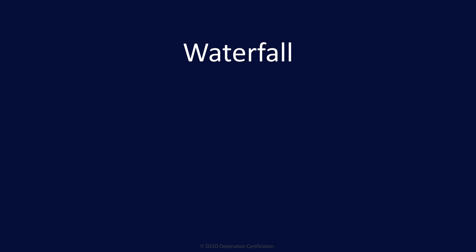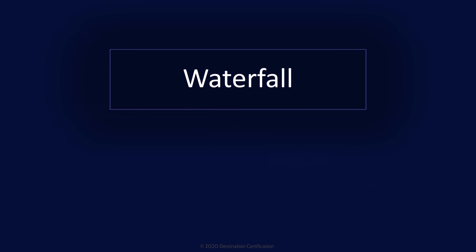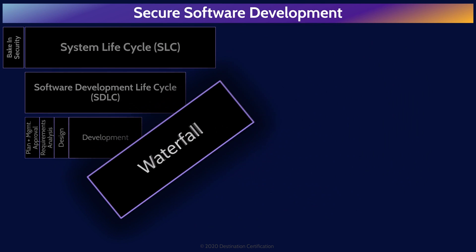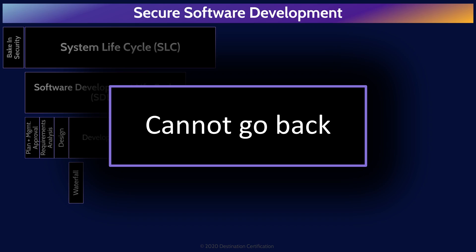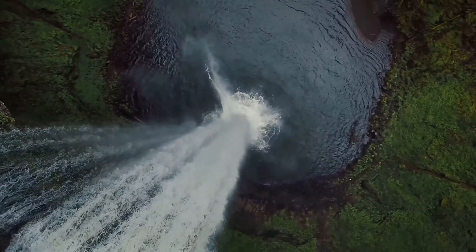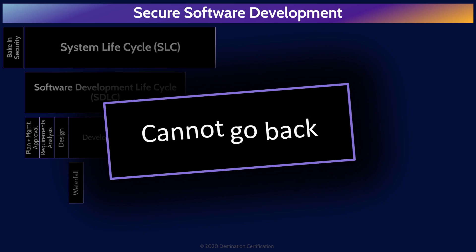Waterfall begins with a plan, then defining requirements, building, testing, and finally releasing. The defining characteristic of waterfall is that each of these phases are conducted one after another — you cannot go backwards. Water can only flow downhill. So if you discover as part of a two-year waterfall project that you missed a requirement, you can't go back and redefine the requirements. You must proceed through build, test, and release, and then include the missed requirements as part of the next waterfall cycle.